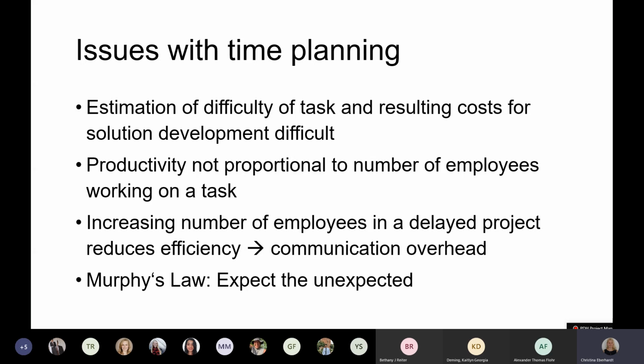So for example, those critical paths, we already have those critical paths if everything goes as planned, so we definitely want to de-densify those. It is okay to have one critical path in the project. It is risky, but okay. Having more than one critical path in a project is highly discouraged, because then you might end up with failures all over your project and not being able to react fast enough anymore.